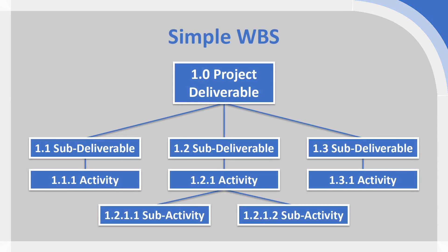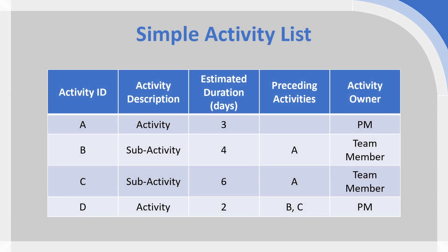We have a work breakdown structure here leading to a single project deliverable, and we have four specific activities which go into our activity list because they are the four activities at the lowest level of each branch. We're going to label those activities A, B, C, and D. From our activity list we have estimated durations for each activity in days: three, four, six, and two days. We also have preceding activities as well.